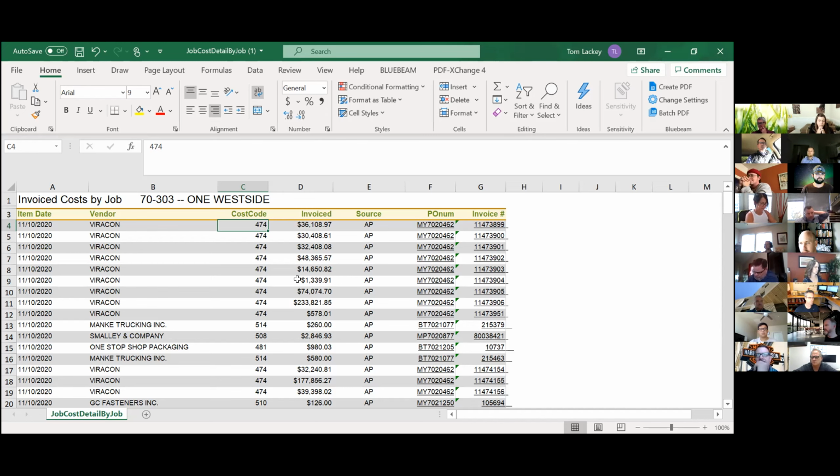Right. I think typically up here, for providing invoices, we're not allowed to do the markup on most jobs here. When we give invoices, we're not marking up because we're not allowed to bill for profit at the time. Yeah, and again, you're going to have to address that on a job by job basis, but if you can put markup on it, it should be 20%.